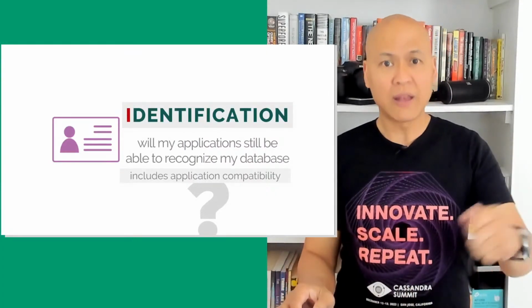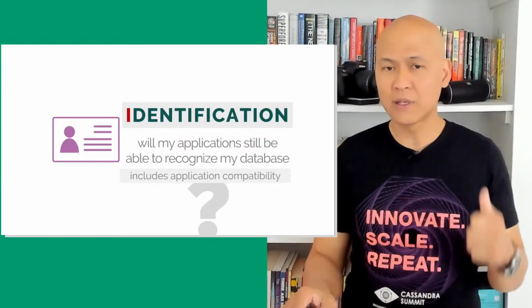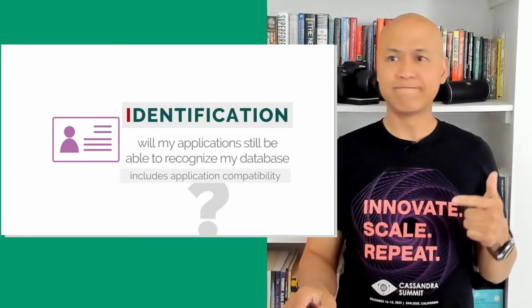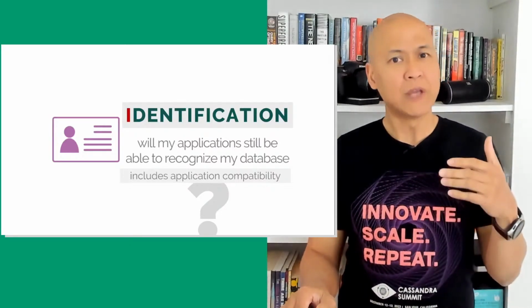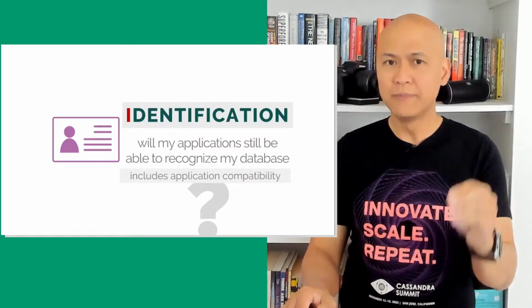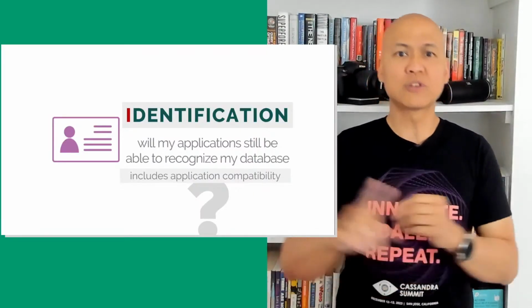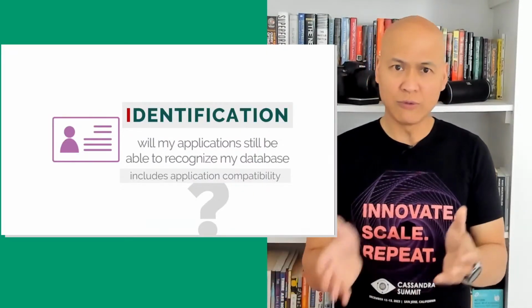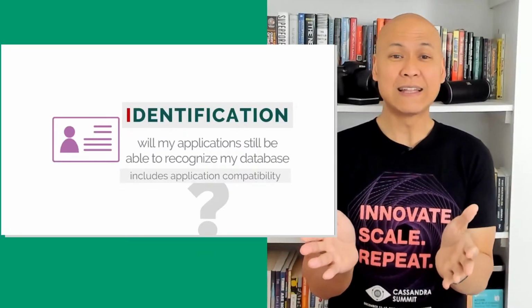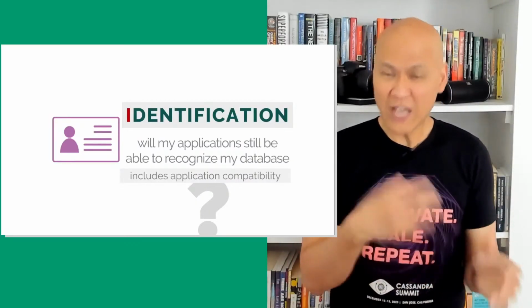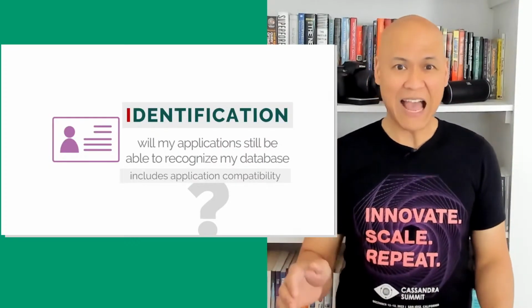You reconnect your application to the database, you do functionality testing, smoke testing, connectivity testing, everything that you can do, as much as you can test, and observe the behavior, because if the behavior is not the same, even though you successfully migrated your databases to a new version, your application might not function the way it used to function. You got to catch that even before you do phase two, which is the actual migration.